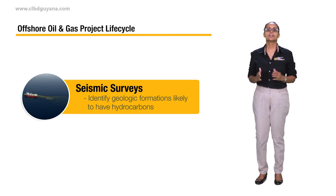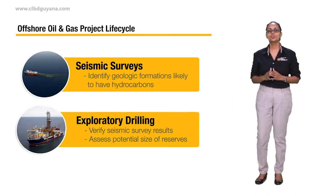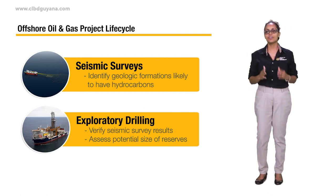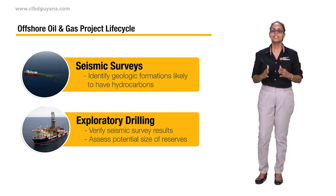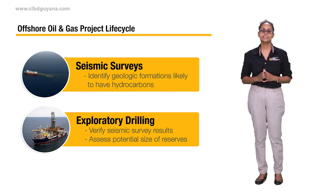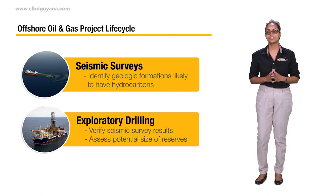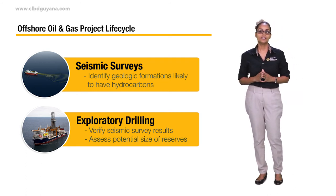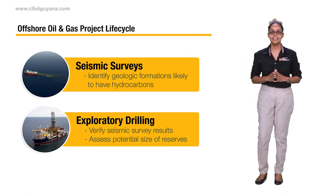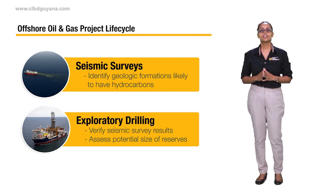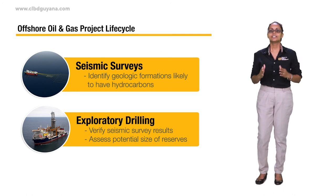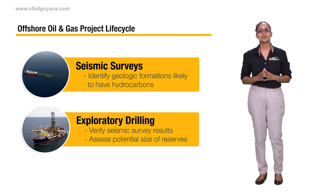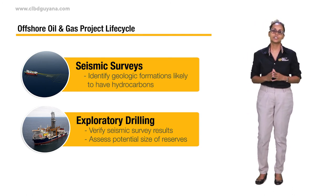If the survey results return positive indicators for the presence of hydrocarbons, exploration wells are drilled to verify that there are, in fact, hydrocarbon reserves. Exploration drilling is also necessary to verify the scale of the reserves. Wells are expensive — over U.S. $250 million — and a company may drill and not find anything. It may take several exploratory drilling wells to find a reserve. Drilling is key, but does not guarantee any returns on the investment put into the exploration activities.